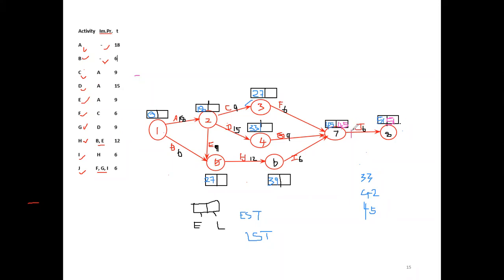Now notice. Now we'll come to 7 to 6. Now we have to consider only the latest start time, LST. 45 is there. Now for the I activity, 6, so 45 minus 6, only one route, no? Only one route. Now 39. So put the 39 here.